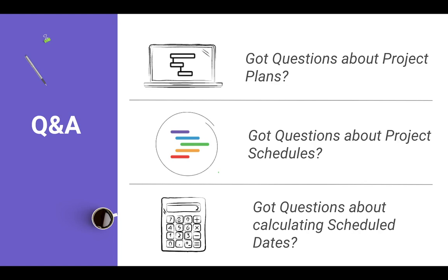And when those user estimated dates are created, those are going to set the scheduled date. And those scheduled dates will be used to put tasks on users' schedules, so on the scheduled dashboard, on the weekly timesheet, for example, because you have already said as the project manager that the assignee should be able to estimate and schedule their own tasks.